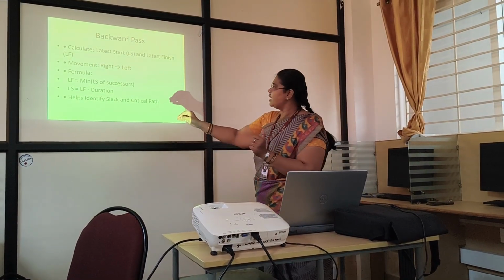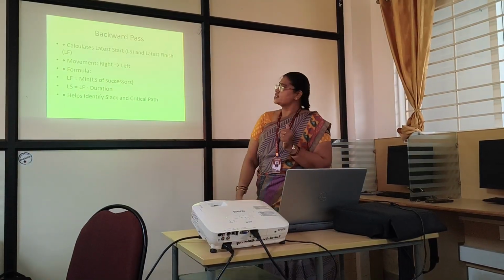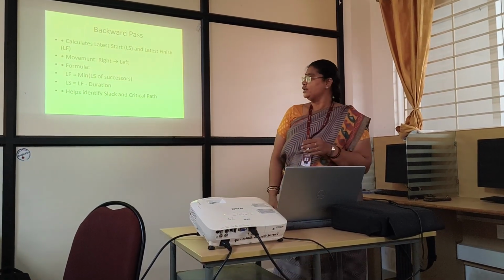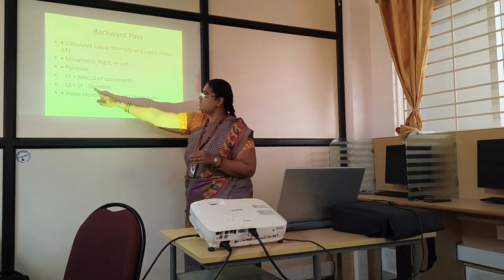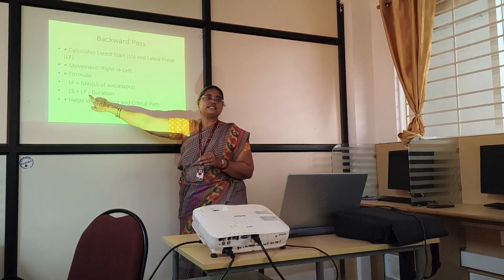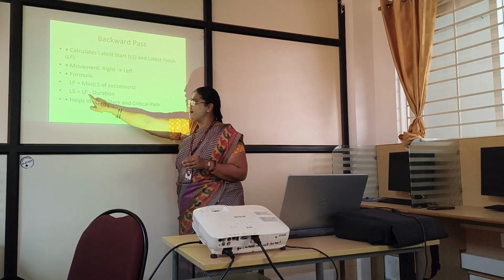So that is what the value of successors is. That is LS of successor, meaning the latest start of the corresponding successor value. Then we are going to define it here. Previously we added the value along with the earliest finish. Am I right or not? Now it is LF minus duration.